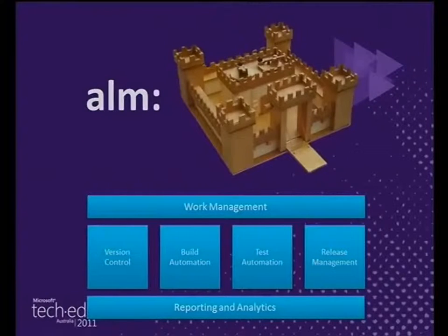All right, so he does his back-of-the-envelope calculations. But what's really happening is that the 20% that they're waiting on is on the other teams, and he's got no visibility of what he needs to do to actually unblock that work. So in order to solve that problem, you need to get the teams not just checking their source code into a common location, you actually need them tracking their work in a common location.